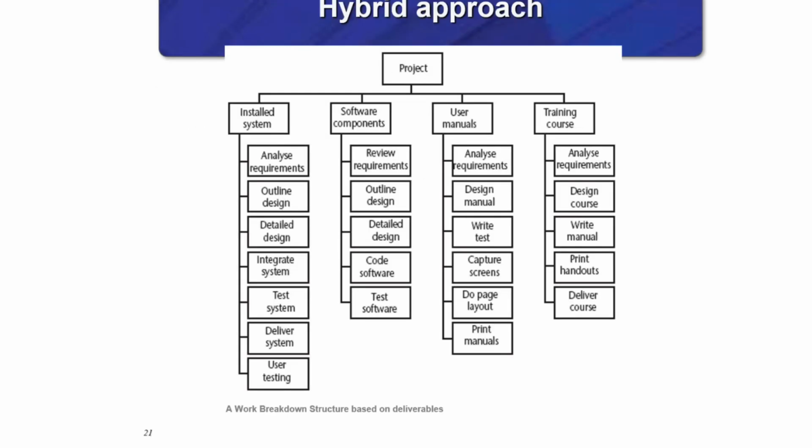Okay, this actually comes from using the IBM approach to illustrate a project. A project basically has a very structured network, based on deliverables. So there are 5 levels. Level 1 is the project, level 2 deliverables, level 3 components, and level 4 work packages, so groups of tasks needed to produce the component.